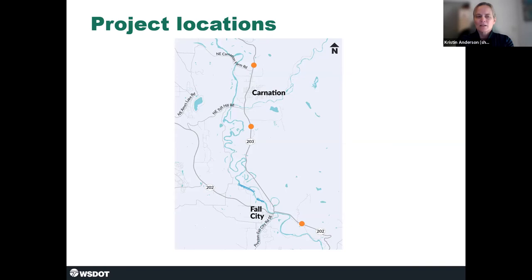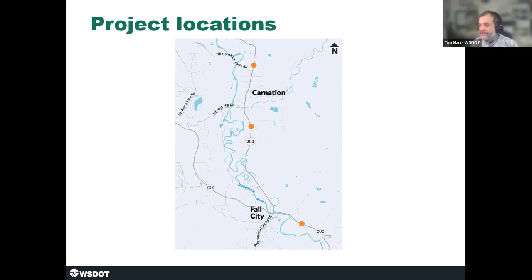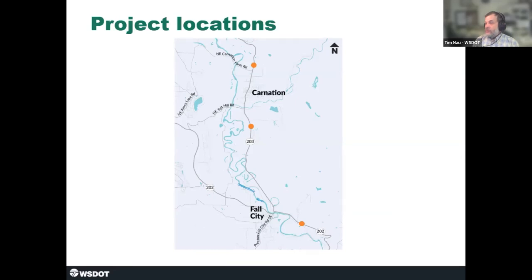A question about Mud Creek, which is a few hundred feet east of Skunk Creek crossing SR202: Mud Creek is another project coming to WSDOT's office eventually. It was originally included in this project but was separated due to complexities involving coordination with King County, who also has a culvert there that needs replacement. The goal is to do it as one combined project, so it will be addressed in the near future.